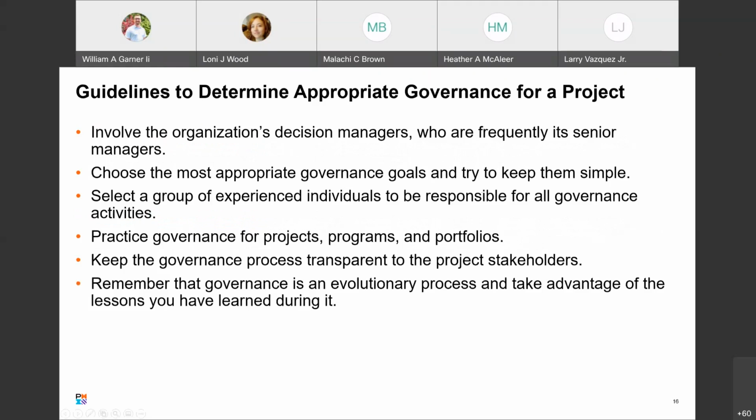Go ahead, please. Thank you. I think a good example of that is if you're in the process of going through a gate to get funding and they haven't voted yet, and you start talking to the technical people. You're sort of overlapping, talking to the technical people before funding. So I think that's an example of overlapping. And sequential would be you get the funding and then you talk to the technical people. Would you agree, William? That's a great example. Yeah, no, that's a good example. I like that.